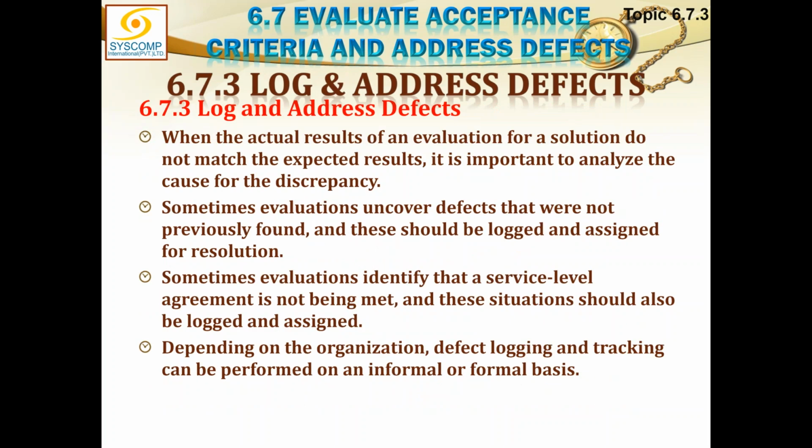Third is log and address defects. When the actual results of an evaluation for a solution do not match the expected results, it is important to analyze the cause for the discrepancy. Sometimes evaluations uncover defects that were not previously found, and these should be logged and assigned for resolution. Sometimes evaluations identify that a service level agreement is not being met, and these situations should also be logged and assigned. Depending on the organization, defect logging and tracking can be performed on an informal or formal basis.